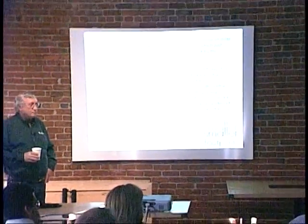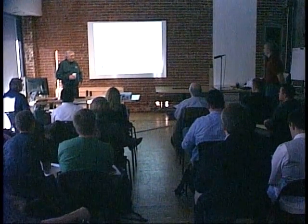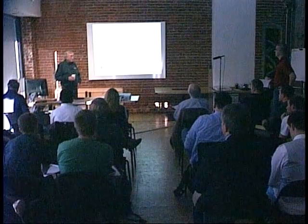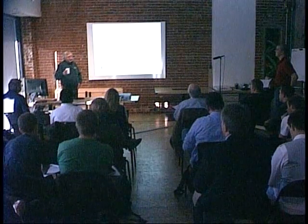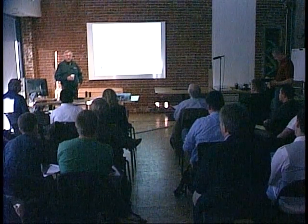So, on the topic that you just asked, are you able, or do we need to get it from Gary, to talk about roughly how much in dollars additional equipment was required, or maybe in percentage of the original equipment cost? Well, I would be uncomfortable giving you the cost. I will tell you that the cost to change it, or to make it work, was more than the differential in the cost when it was first bid. So it cost more money to fix it than it would have to do it the first time.